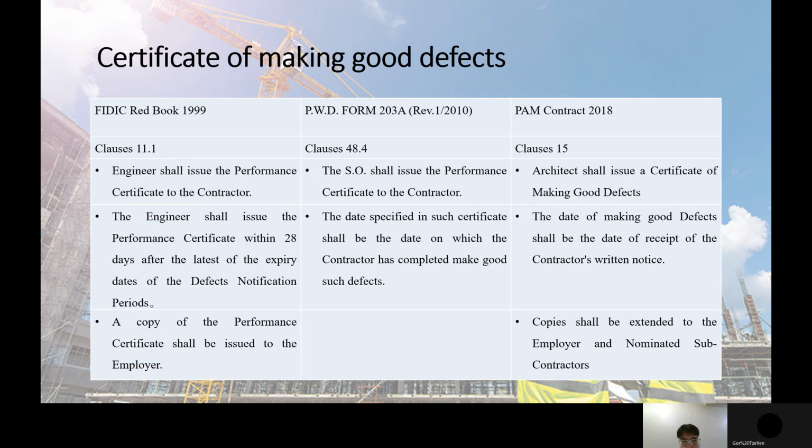Besides that is PWD Form 203A, clause 48.4. The SO shall issue the performance certificate to the contractor. The date specified in such certificate shall be the date on which the contractor has completed making good such defects. Next is the PAM Contract 2018.